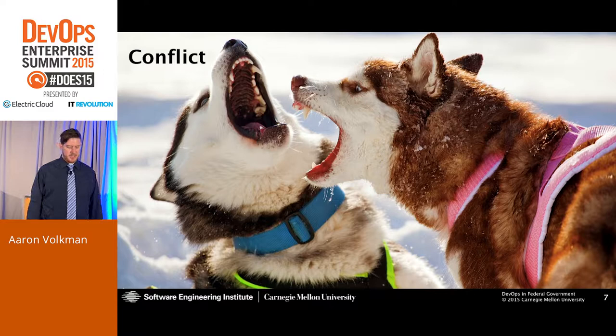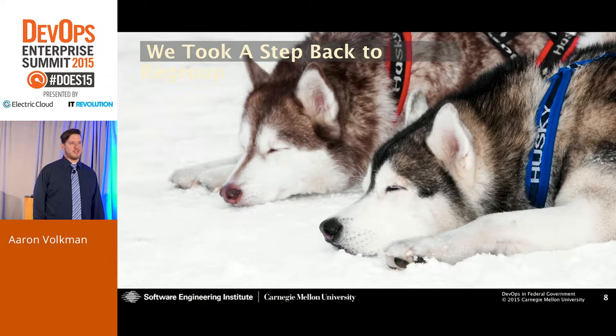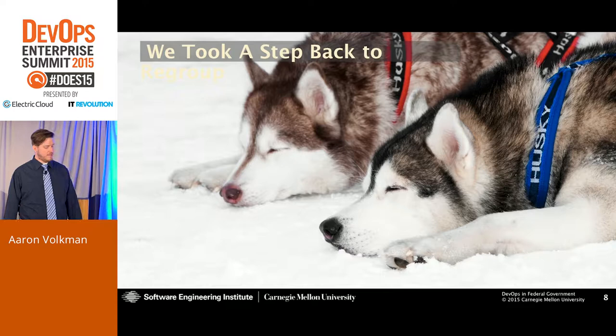So what we did is we rested our little heads in the snow, closed our eyes, and took a step back to regroup. Through working with our customer, we gained access to proper test environments on our customer's side, because we learned that environment parity is key, and there's just no way we're able to 100% replicate their production environment within our own organization. By that time, we learned who the key people were who needed to be engaged early, and so they were involved and on our side.